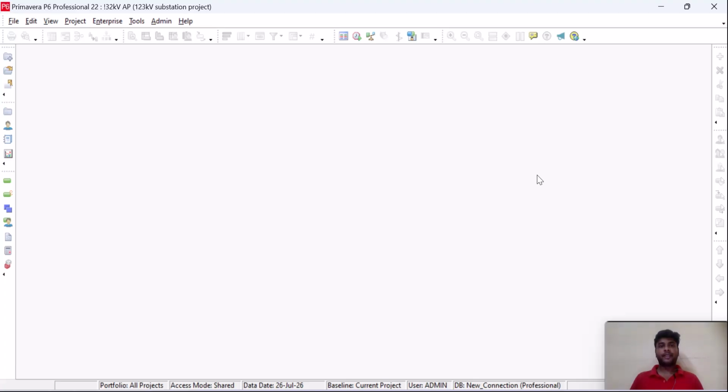So where the project is allocated, and in which business unit, in which department the project has been awarded, and all these things. So while giving the budgets, giving the cost to the team, and to calculate the performance, it will be more meaningful to keep the project in some specified location. So that's why we are using EPS.